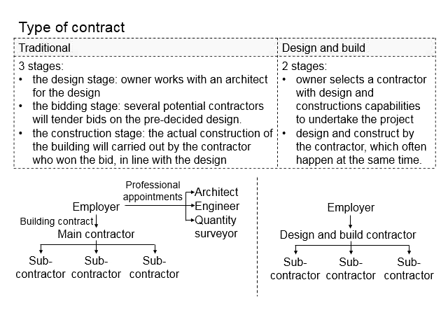Once a contractor is selected, a contract or agreement will be made between the employer and the contractor. The employer will need to pay for the work done by the contractor, and the contractor will need to build the structures in accordance with the design specifications and ultimately deliver to the employer with good functionality up to the intended standard as stipulated within the contract document.